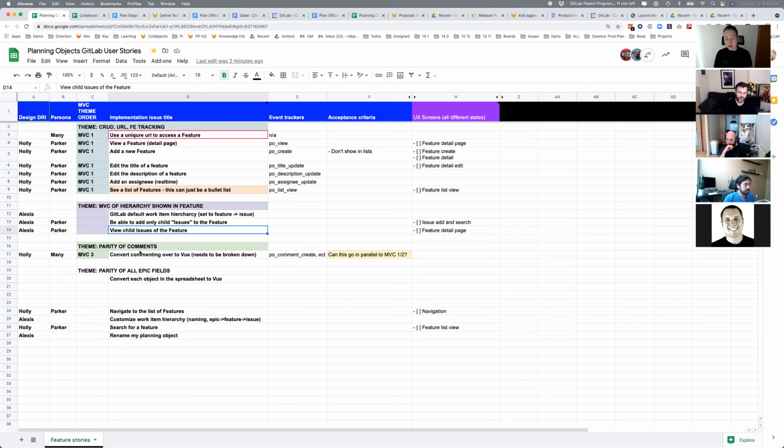So we do have some play, and I put them in themes, but they don't have to track to a 30-day window right now. We could get more specific later once we've got weights on these things. Once the team's going, maybe they'd say, oh, I converted all 20 of these object fields over in like 10 points, so maybe we'll get more specific once we're off the ground, but I know it's blurry beyond the first release or the first theme, I guess.